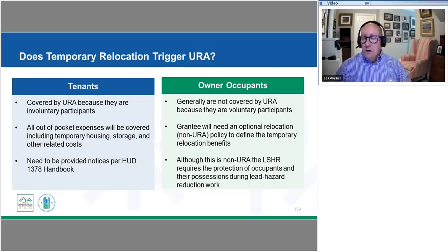So kind of some protocol of, we're going to give you, we think it'll be approximately this time, but we're going to keep you posted on any shifts in that schedule, and you will be getting a notification 3 days in advance and then 24 hours before, so that everybody understands how that protocol is going to work for this, and that will help with some of the confusion and maybe complaints along the way if everybody understands how that's going to function.